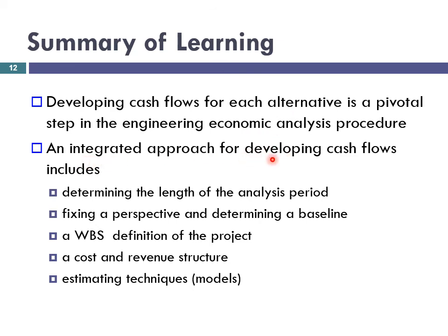In order to develop these cash flows, we learned an integrated approach, and according to this approach, we need to determine the length of the analysis period. We need to fix a perspective and determine a baseline. The perspective is usually the owner's perspective. A work breakdown structure definition of the project is important. We need to define a cost and revenue structure, and remember, for these cost and revenue categories, the included costs are usually the capital costs, operating costs, maintenance costs, material costs, labor costs, and the revenues resulting from the sales and the market value at the end of the lifetime. And we learned different estimating techniques or models that we can use to estimate future costs.